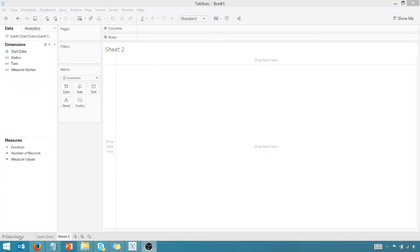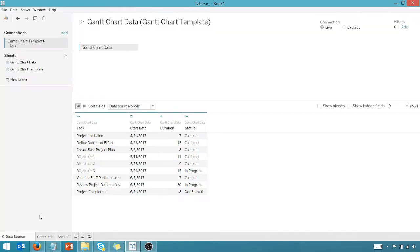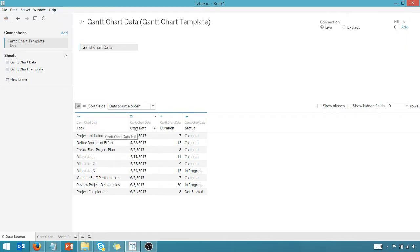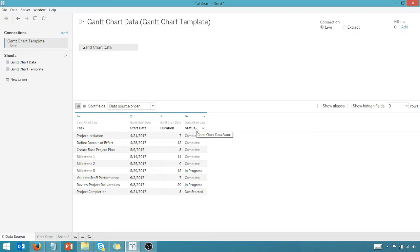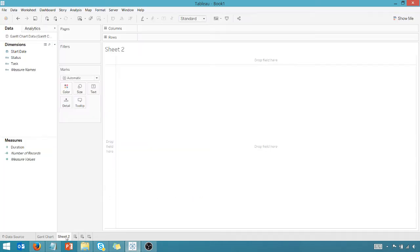So let's get started. Here are the minimum fields you're going to need to start creating a Gantt chart in Tableau. You're going to need a task, a start date, and a duration. If you want to throw a status in there, that's optional - complete, in progress, not started. That's completely up to you. But at a minimum, you're going to need those three fields that I just showed you.